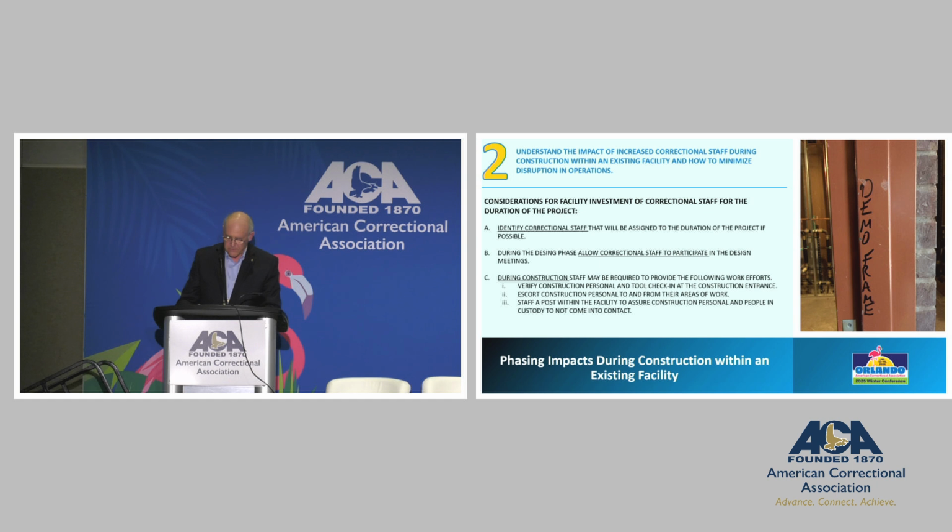Our next item is understanding the impact of increased correctional staff during construction within an existing facility and how to minimize disruptions in their operations. And again, we want considerations for facility investment of the correctional staff for the duration of the project. And again, it's critical to identify your correctional staff that will be assigned to the duration of the project from start to finish. This is a real benefit. And during the design process, please allow these staff to actually go to the design meetings, because these staff always have good suggestions to the design team, which makes your design a much better facility.